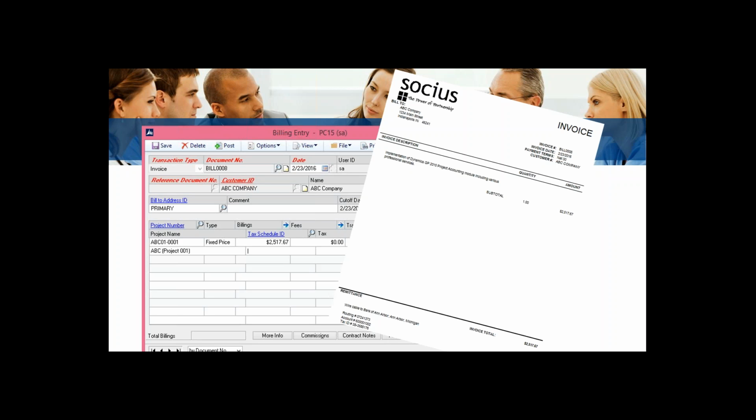I can create my invoice to bill at the project level. That's sub-deliverable. And then in that case, my invoice may have 4 or 5 lines, and it will show me totals for each of my individual projects. I can bill at the cost category level, my cost groups. If I wanted to bill and show that level of detail to my client, I could build my invoice template to bill at that cost grouping level. And finally, if I wanted to, I could bill at the individual transaction level if I wanted to show that to my clients.